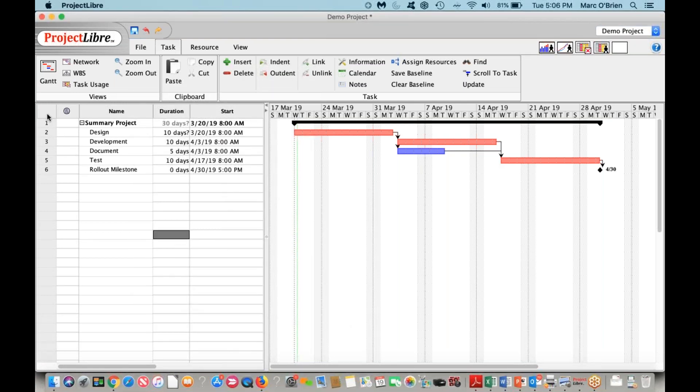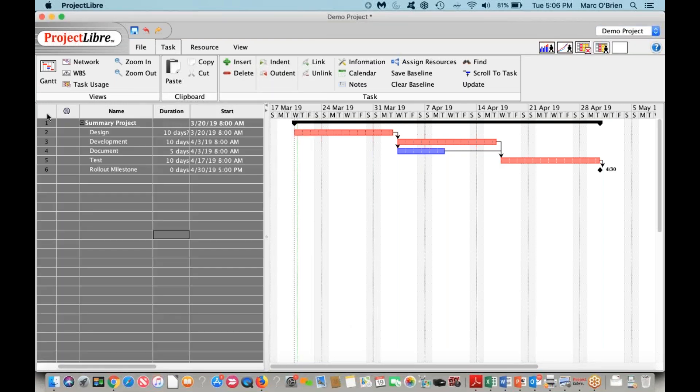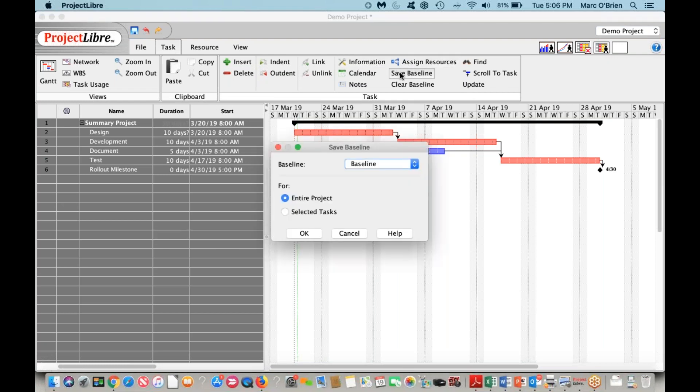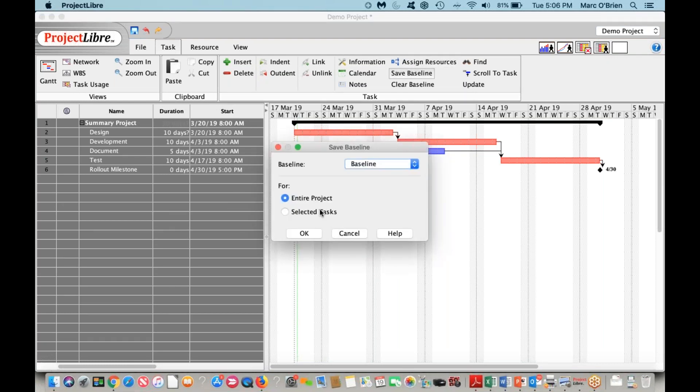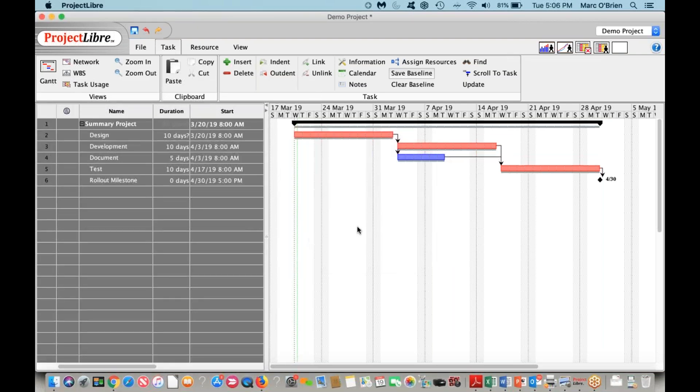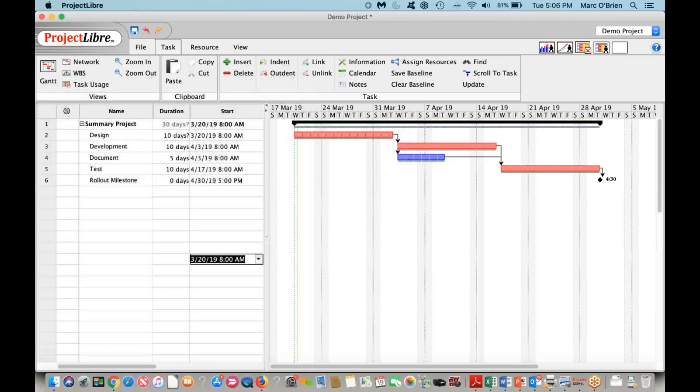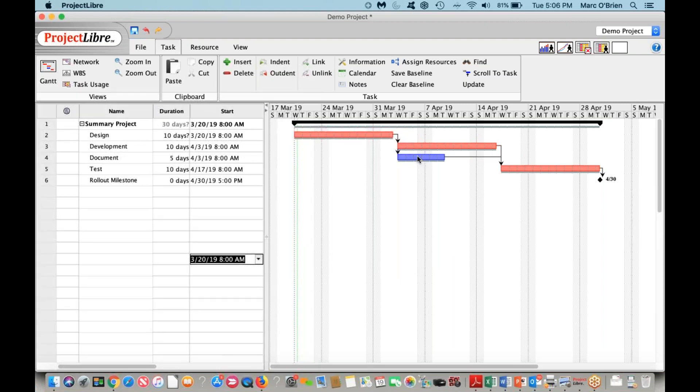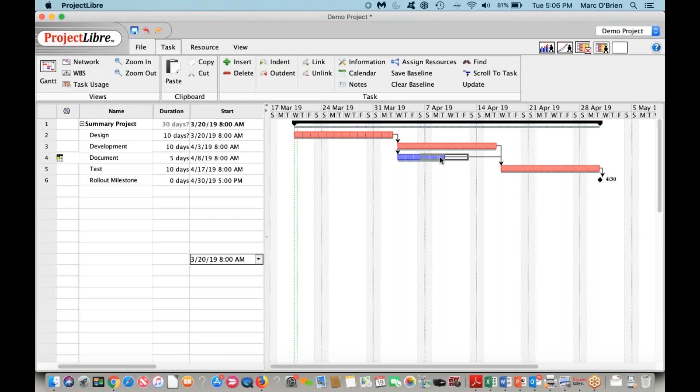I can also come through and save a baseline for this. There are many baselines you can save. I'm going to use just an initial baseline on the entire project. And when I do so, you're going to see that there's a little gray line below. If I put the cursor in the task and move it, you are going to see a couple things occur. One is the baseline is now deviated from the actual schedule.